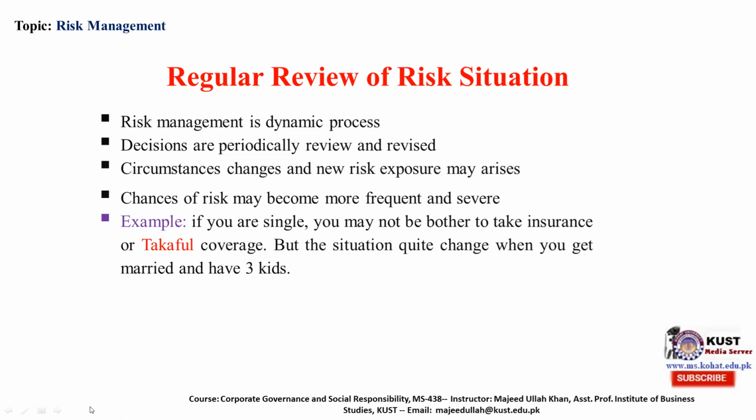Regular review. The environment in which the company operates is not static, it is dynamic. So when the company is operating in a dynamic environment, the risk management process must also be dynamic. The decisions are periodically reviewed and must be revised. All the lists should be checked time and again. Circumstances change and new risk exposures may arise. So you should assess your risk on a regular basis.